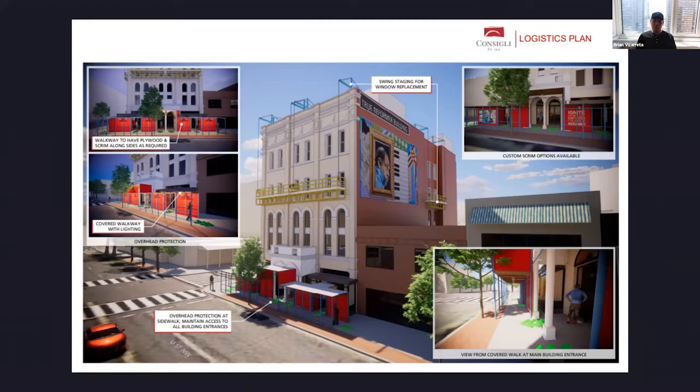If you have your existing tenants being occupied in a certain portion of that building, what are they going to see every day when they walk out? Say, for example, a hospital renovation project. If you're going to shut down one area of the hospital, what is that going to mean in terms of not just optics, but logistics on how people even get around, trucks getting in and out, et cetera.